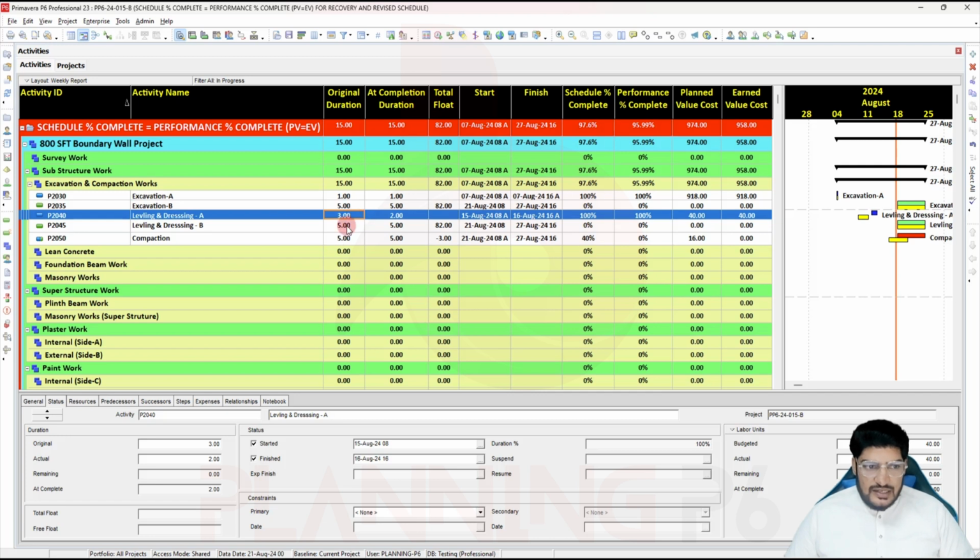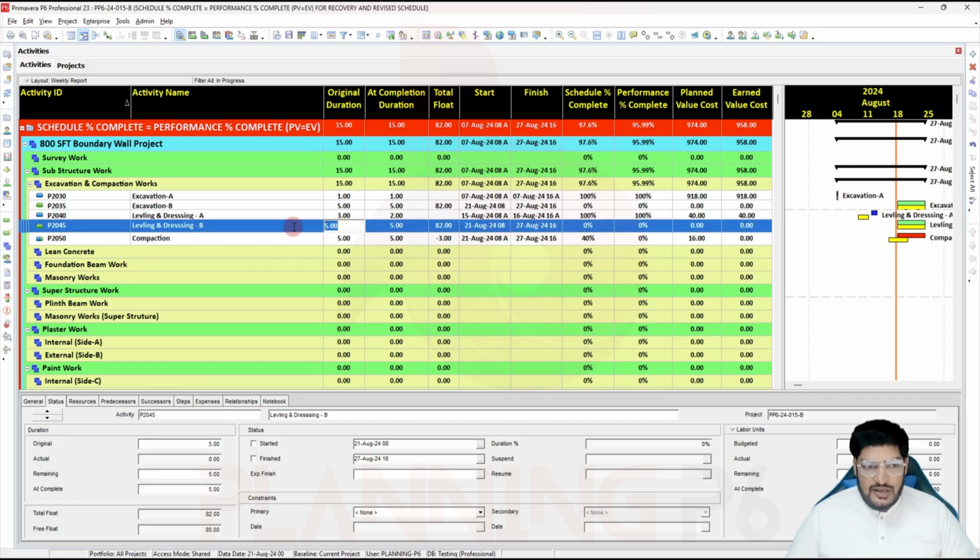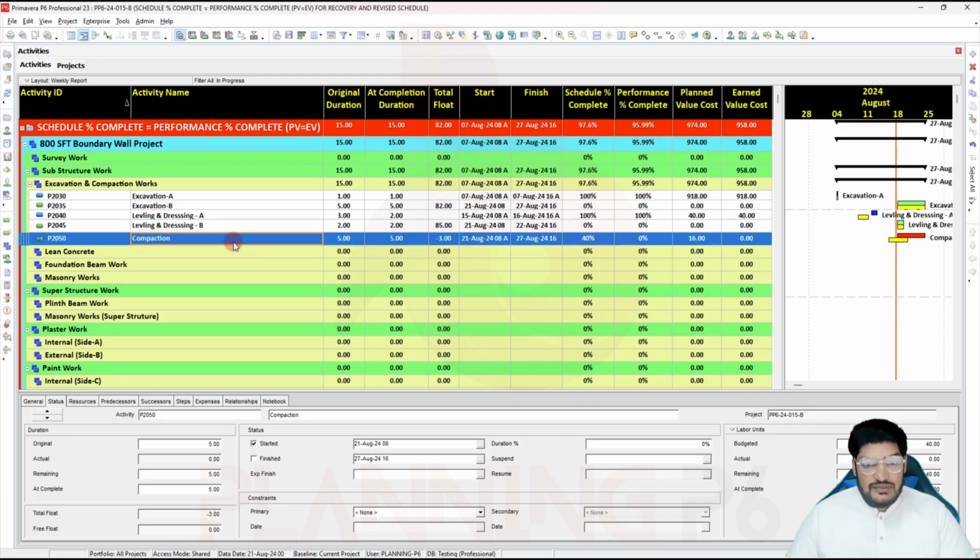I will just write here, but you will apply the factor, whatever is how much completed. For example, from the 100 it is completed 70%, you will calculate 70% of the duration and assign that to the activity, and the remaining we will carry for that. So this activity is 2 days. Let's say this activity will consume 2 days. Okay, and now we will add this activity. For this we need to do it for every in-progress activity.